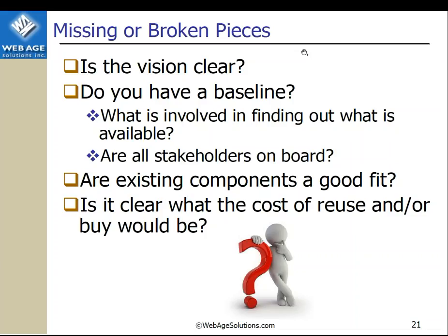I mean, how many of you as architects have been frustrated where you're having a conversation with the business where they're going, okay, this is what we want, how long is that going to take, or how much money is that going to cost? And they're asking that within the same conversation. And then what you want is to say, okay, I've got your request, give me a day and I'll get back to you, but in reality, is it only going to take a day? Well, if you have a clear vision and you have a baseline, then within a couple of days you should be able to get back to them with an estimate, right? So this would be another area, so maybe it's not missing, but maybe it's incomplete.